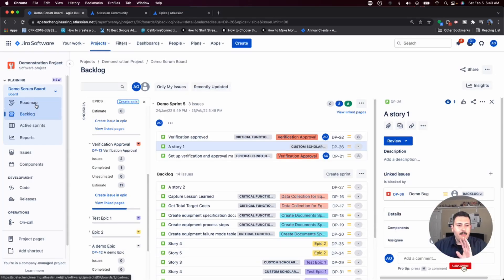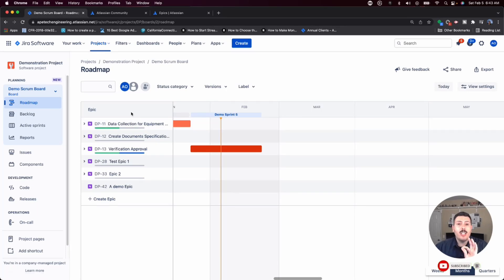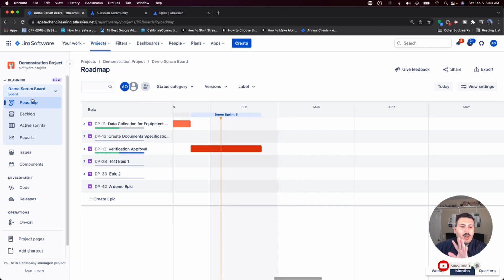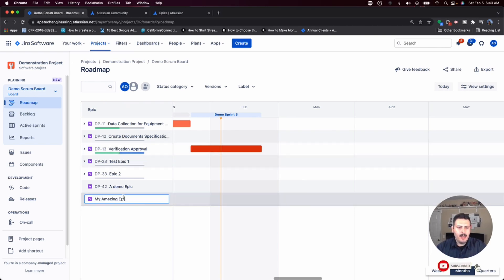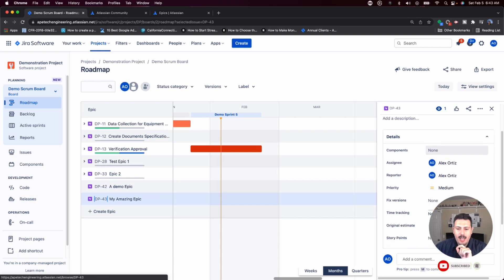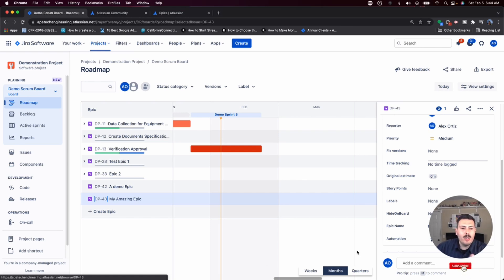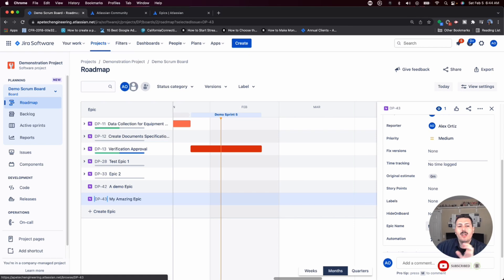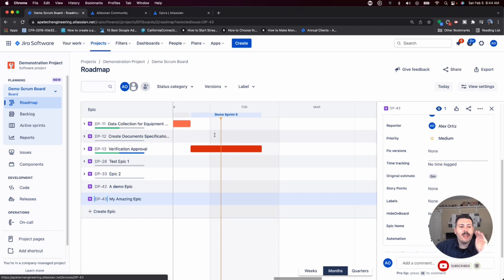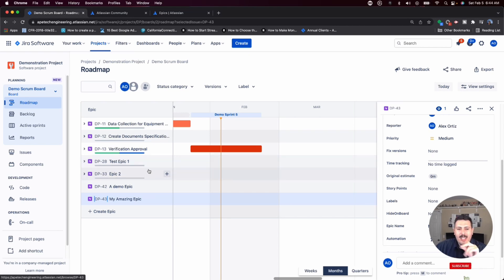But a powerful way of creating epics so that you can cheat. Now this is a shortcut, but this is a very valuable shortcut. If you use the roadmap here to create an epic, my amazing epic and you hit enter, Jira is going to go and automatically create the epic. As you saw it did DP-43, but most importantly, the epic name, the one that I was telling you, you have to be careful, you have to basically put it in twice. The epic name in this view only in the roadmap view only will automatically append the epic name for you. So if you don't want to always fill out that epic name and you just want to do like a lazy notation, make sure you come in through the roadmap and create your epics here because this is going to give you this raw power to basically be able to instantaneously create epics.